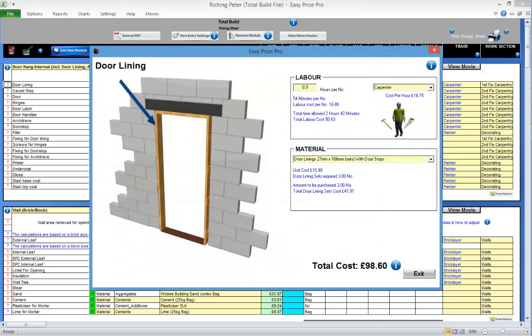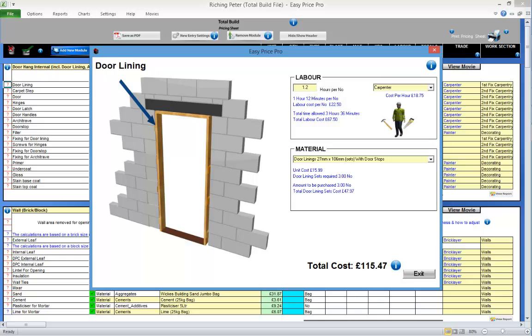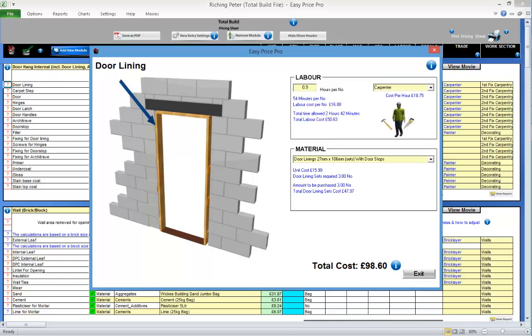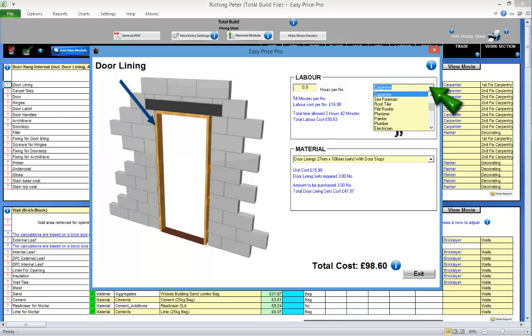Here you can fine tune the details. So the time taken to fit a door lining can be adjusted. You'll notice that if this time is changed, you can instantly see how the cost of this item will be affected. You can adjust the tradesperson allocated to carry out the task in this drop down menu.